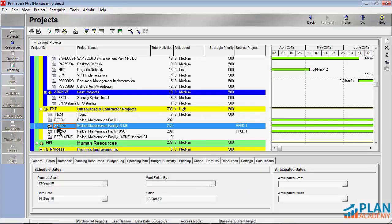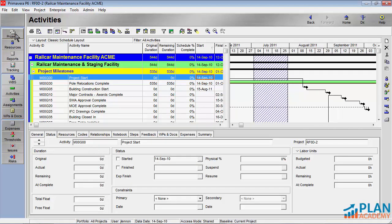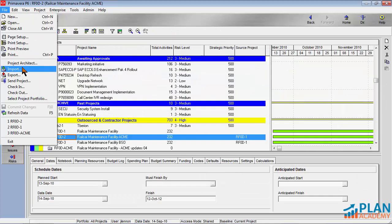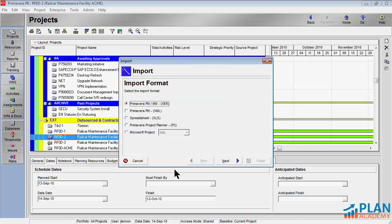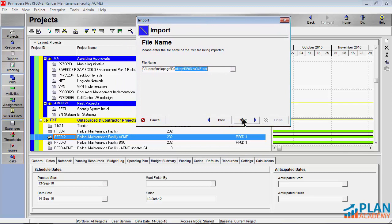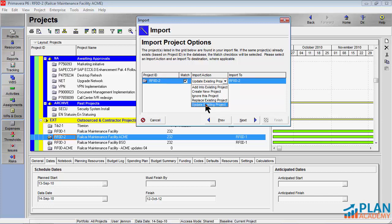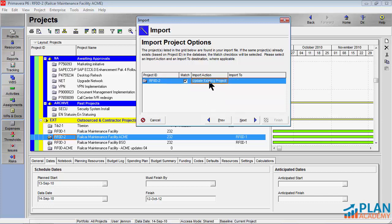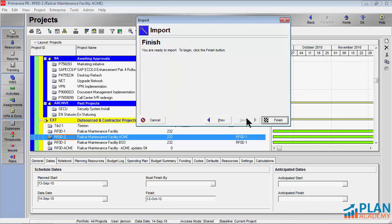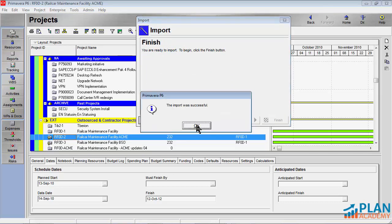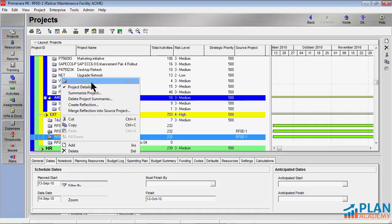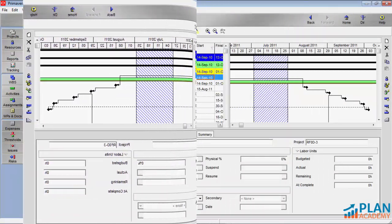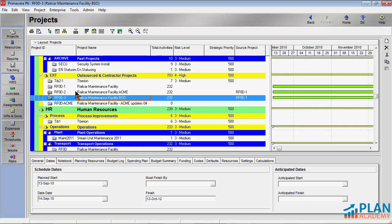To import an XCR file and update it, I need to have that project open first. So I'll go ahead and open my ACME project. Go back here and do an import. Again, you can ignore that error. So there's my ACME import file. So I'm going to go ahead and choose it. And this is what we want to see. We want to make sure that this import action says update existing project. And again, we'll just make sure we have the selected project, we'll go ahead and import. Now that I have both of those imports done, I can actually do the merge process now. And this is where everything kind of comes to a head. This is the point of this.